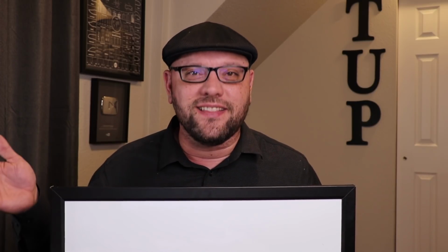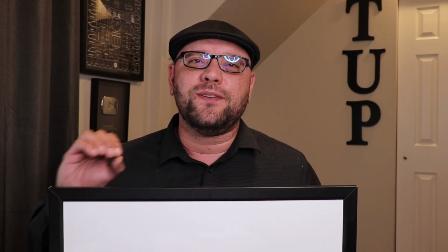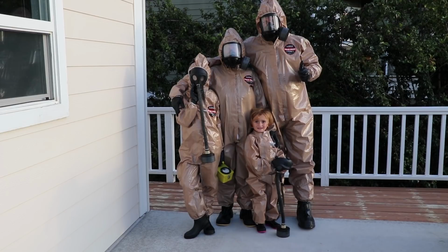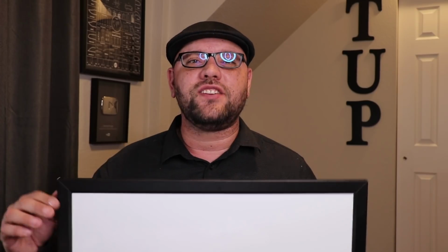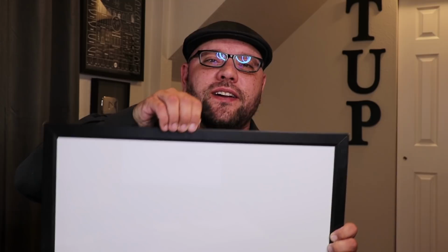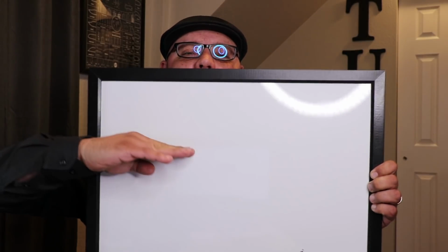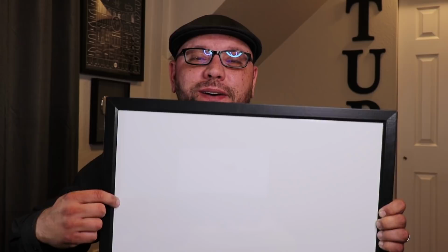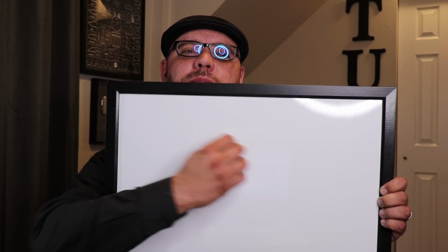in progress, and done. So for prepping, you may be by yourself prepping, you may be married, but maybe your significant other doesn't like prepping, for example. But if you do have a team of preppers within your household, maybe you, your significant other, and maybe one of your children, you could each have a row then, and those rows are used for the individual people. So while you have your to-do list, your in progress, and your done column, you'll also have some rows for each individual person. So you'll have the Cliff row, and then you'll have the wife row, and then you'll have the kid row. And everyone's going to be doing the same strategy.